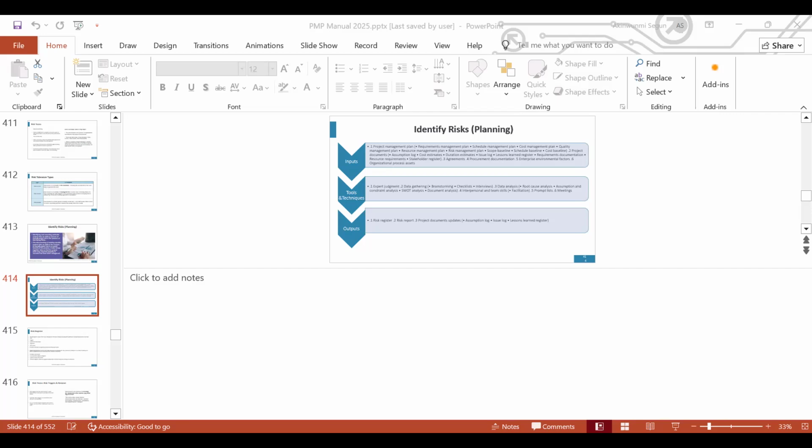Let's look at the kind of risks they identified. Number one, rain. It's sometime in April next year, and April usually marks the beginning of the rainy season. It's a political party campaign, so security is another risk. Traffic is another risk. Power and earthquakes. When you identify risk, you populate those risks in the risk register.